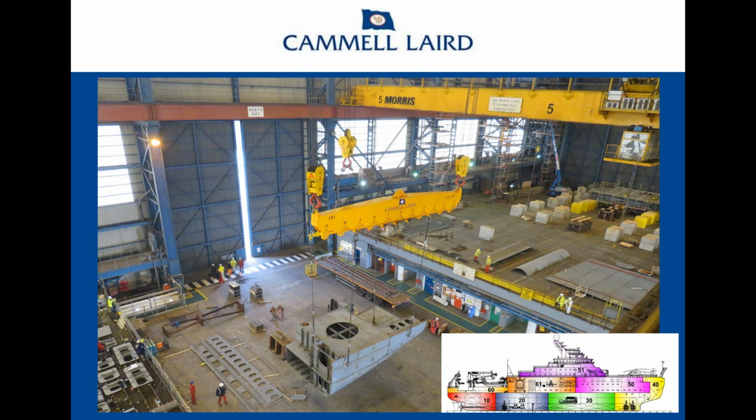Of course, one of the challenges with this sort of thing is that you have to stress and reinforce the structures to enable them to be handled like this. So the business of maintaining geometry goes on really from day one, from the point of manufacture of the subunits, to their rotation, to their installation into the major part of the vessel, and so on.